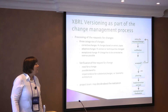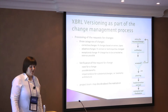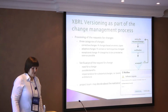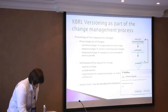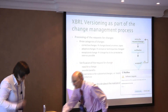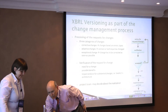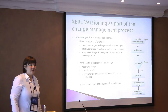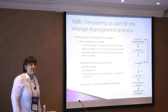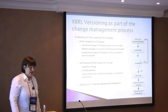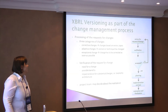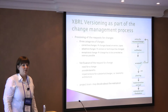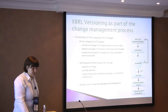When we receive requests for changes, we have to verify if these changes are really needed and if they have possible benefits for us. For bigger changes — perhaps changes on the taxonomy architecture itself — we should make an impact analysis: how much cost is involved, how much time is needed to implement the changes. This should be deeply verified, and afterwards accepted or not by the project team or the person responsible for change management.